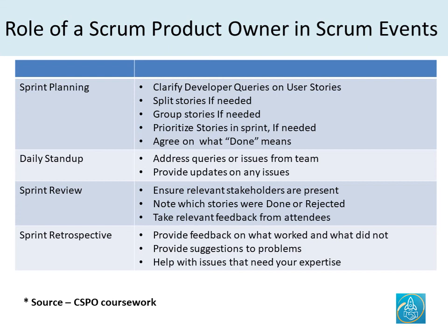During the daily stand-up, it's recommended that the product owner attends those, but given that the development teams are self-organizing, you can take a back seat as a product owner, but you still need to provide any answers to queries on the requirements or any status updates that you may have on the development backlog items.